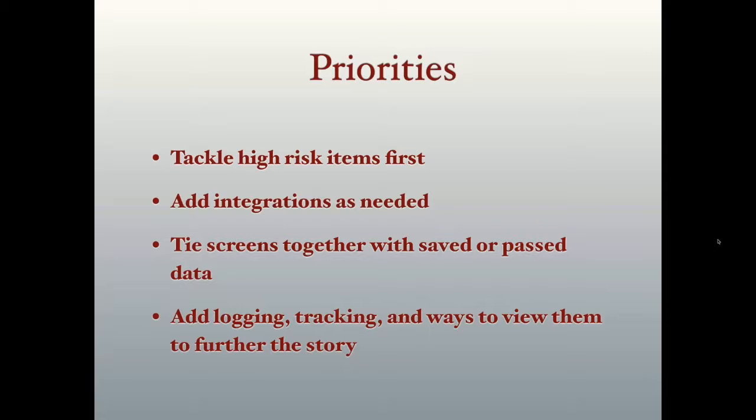High risk items are always, I think integrations are always the highest risk. Anything that touches a system that I can't control as a developer, as an implementer, is high risk because it may not work. It may not work the way I need it to. It may need to be changed. Everything that I would do and how I would integrate with that system may not be how they do it. The data that I have to send them may actually affect my requirements.